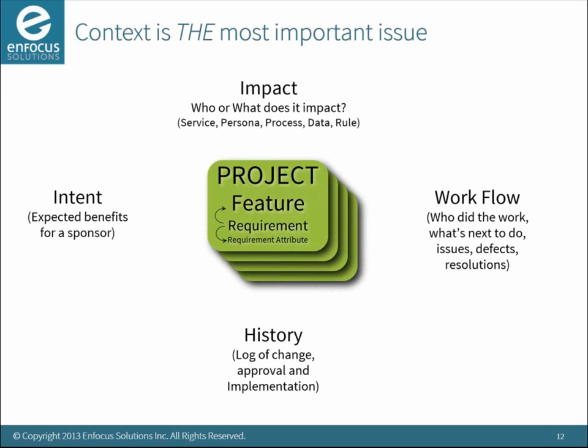Where is this from a workflow perspective? And this is where SharePoint and others kind of break down, because who did the work? What's next to do? What are the issues, the defects, resolution? There's a whole workflow around requirements. It's not that they just magically show up. They have to go through a cycle of ideation, elaboration, approval. All these other kinds of things are states that requirements sit in, right? So unless you're physically moving them from bucket to bucket when you're dealing with a SharePoint site, it's very difficult to deal with. And then there's a history, a log of change, approval, and implementation, right?